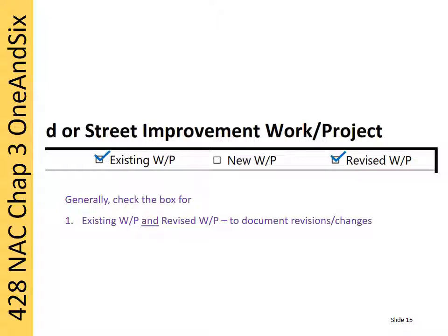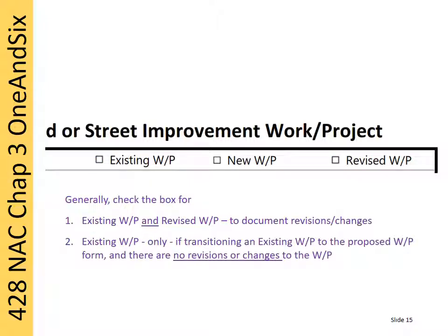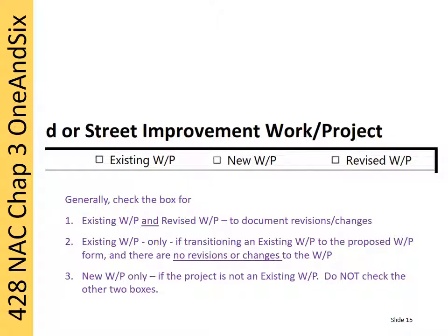The rule of thumb is, if the project is existing, check the existing and revised boxes. Unless the project has not changed and you are only transferring information to a new form, in that case do not check the revised box. If the project is not existing, check the new box and don't check any of the other boxes. Never check all 3 and never leave them all unchecked. Either the existing box or the new box must be checked.